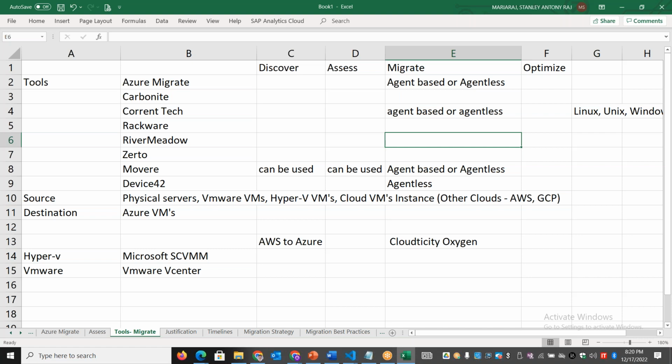So customer will start asking these questions, whether we need to provide any additional network firewall ports to be opened. If the tool requires a lot of complication, then they will not approve it, right? Because the security team will say these ports are already used for something else, or the ports are vulnerable, and we cannot allow you to install the agent on our business application server. So all these are pretty important in deciding which tools is suitable for your environment.